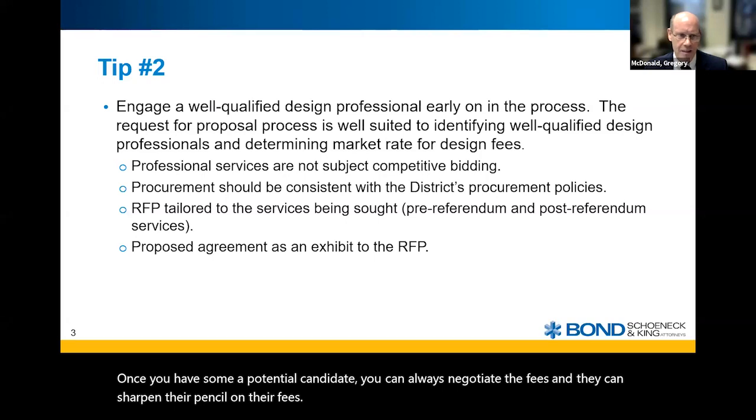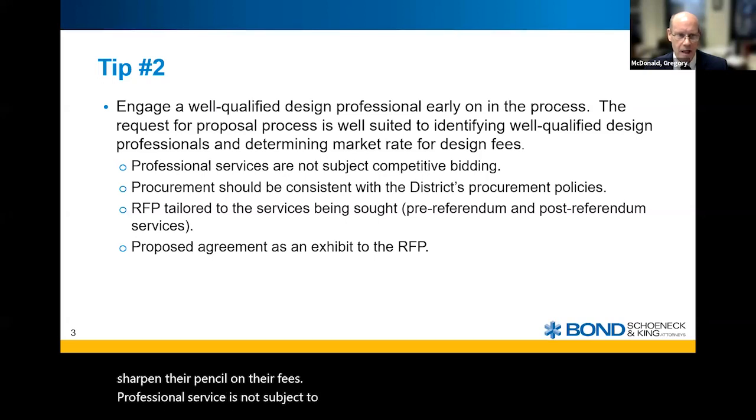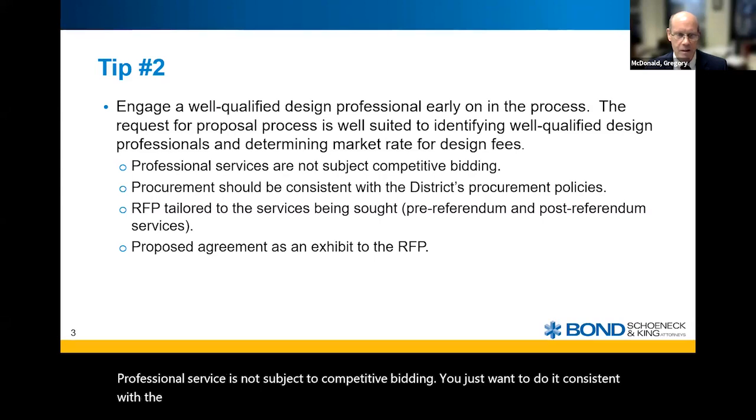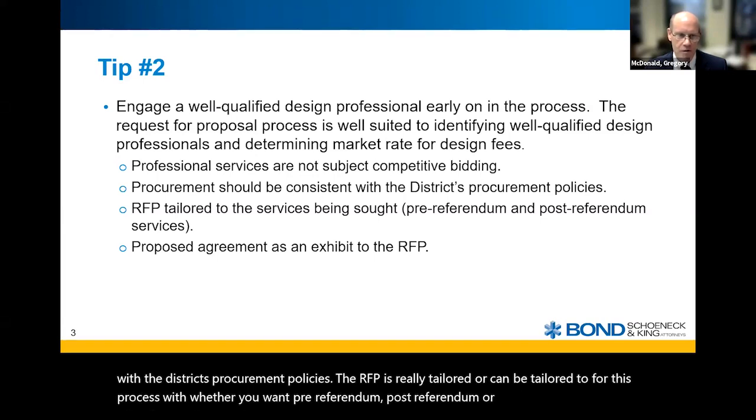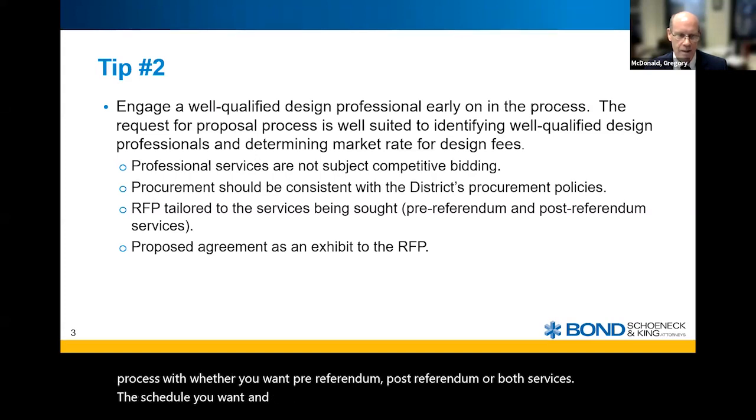Professional service is not subject to competitive bidding. You just want to do it consistent with the district's procurement policies. The RFP is really tailored, or can be tailored, for this process, with whether you want pre-referendum, post-referendum, or both services, the schedule you want, and how you want the compensation to go.